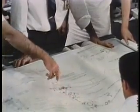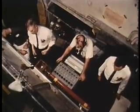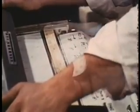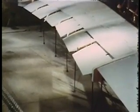You see, we started out with a high lift system. Then, rather late in the game, but as a result of continuing wind tunnel testing, Lockheed engineers found they were becoming critical on the three-engine climb-out. They wanted to trade off some lift capability for some freedom from drag to improve that climb rate. So they shifted to a Fowler flap system, which also changed the slat design. To accommodate a design change this important, this late, and still meet schedule, puts the heat on. And it takes good cooperation all round, as well as good management by primes and subs.